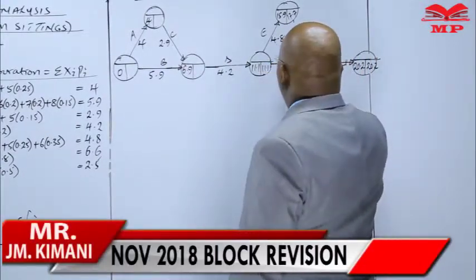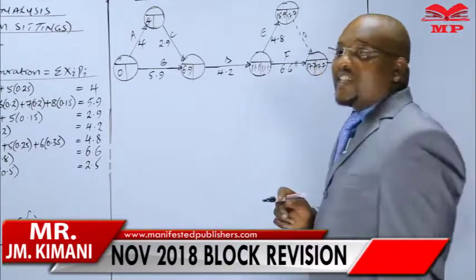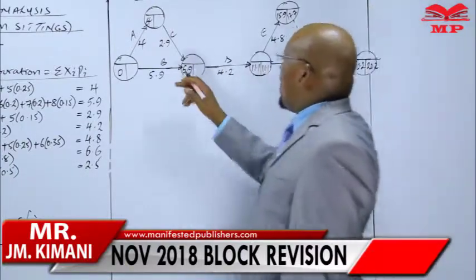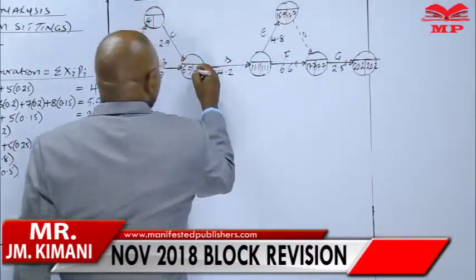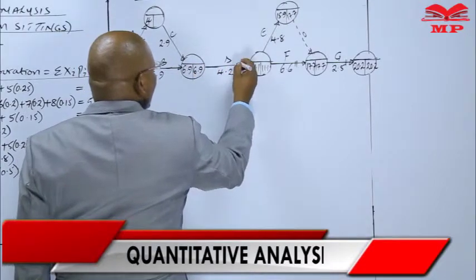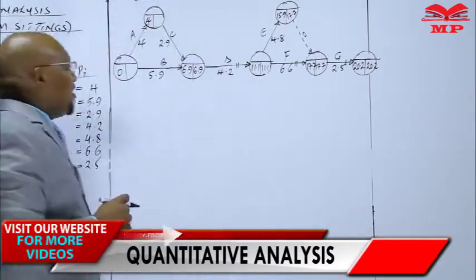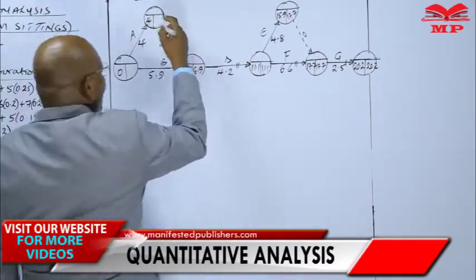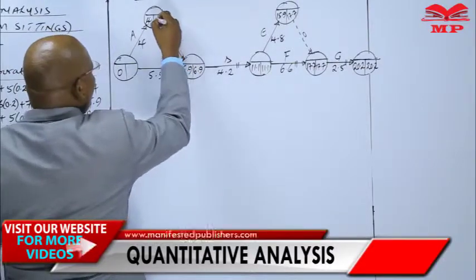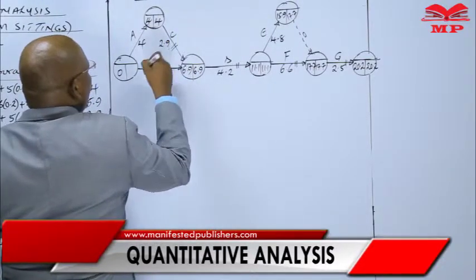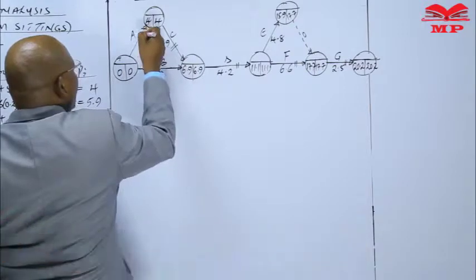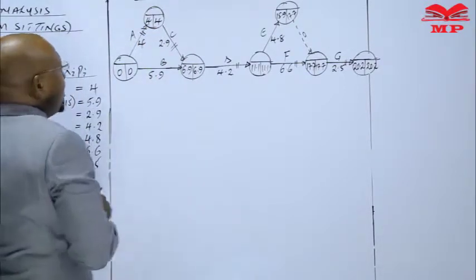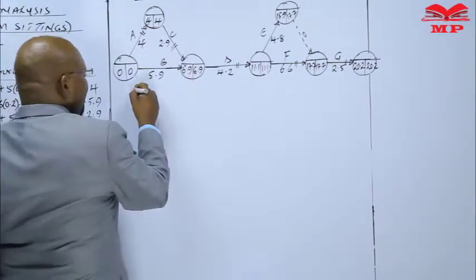Then going down or either this way, you have 11.1. Activity F is the one which is critical. Then going backward, this will give us 6.9, meaning activity D is critical. Then finally, going up here, this will give us 4, which is critical. Then down, this is 0. Activity A is the one critical but not activity B.